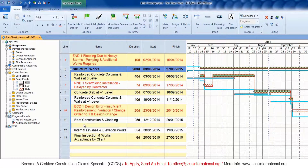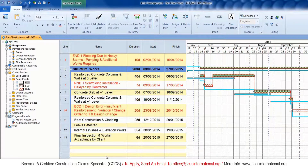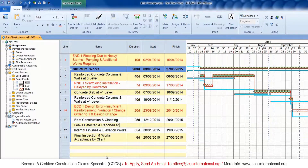Now we're going to insert a fragment with two delay events and we'll also use a summary bar to isolate the fragment, then link it logically to the program by inserting finish-to-start links to the affected activity. Please note that each activity within the fragment should also be linked to each other using finish-to-start logical links.